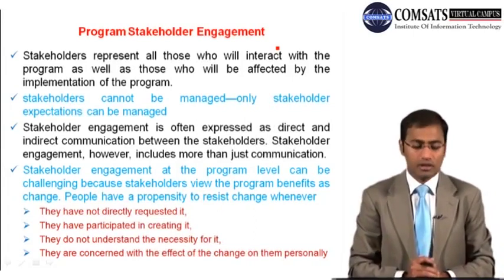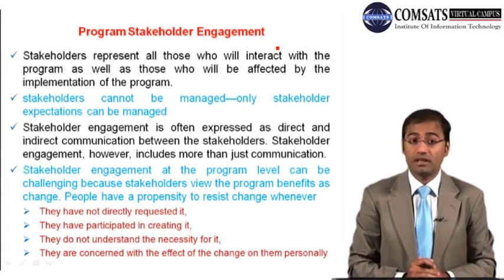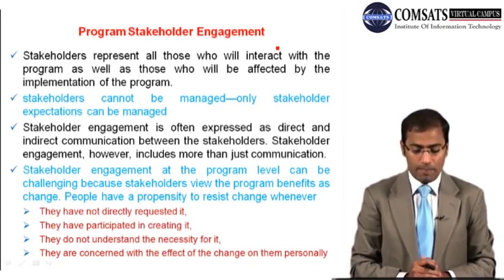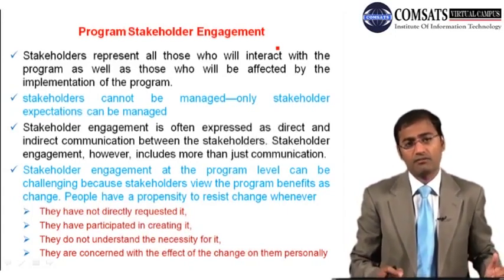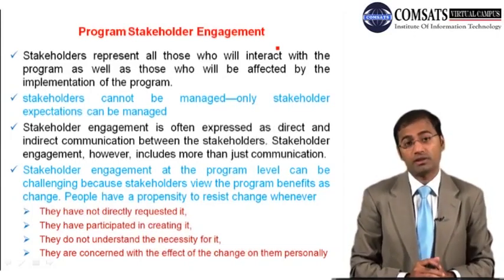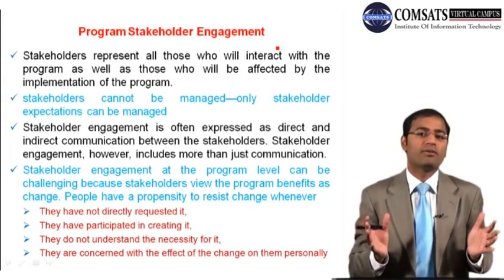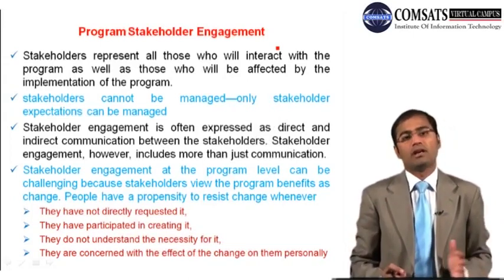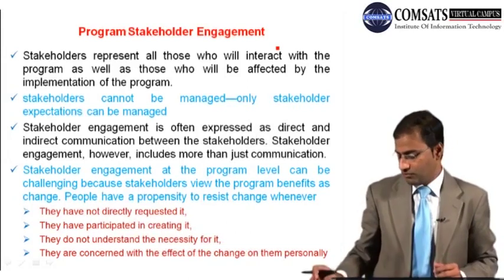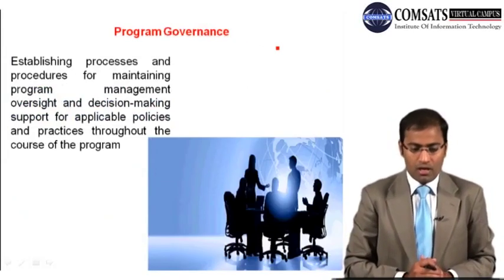And why? Because they have not directly requested it, and they have not participated in it, and they don't understand the necessity for it, and they are concerned with the effect of the change on them personally. So all these are a few things which are leading them to have a belief that the change is not good for them, and we need to manage those.